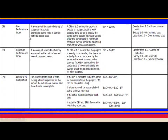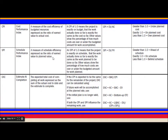CPI (Cost Performance Index) is a measure of cost efficiency of budgeted resources, expressed as a ratio of earned value to actual cost. If CPI > 1, you are under planned cost; if CPI < 1, you are over planned cost. SPI (Schedule Performance Index) is a measure of schedule efficiency, expressed as earned value divided by planned value. If SPI > 1, you are ahead of schedule; if SPI < 1, you are behind schedule.